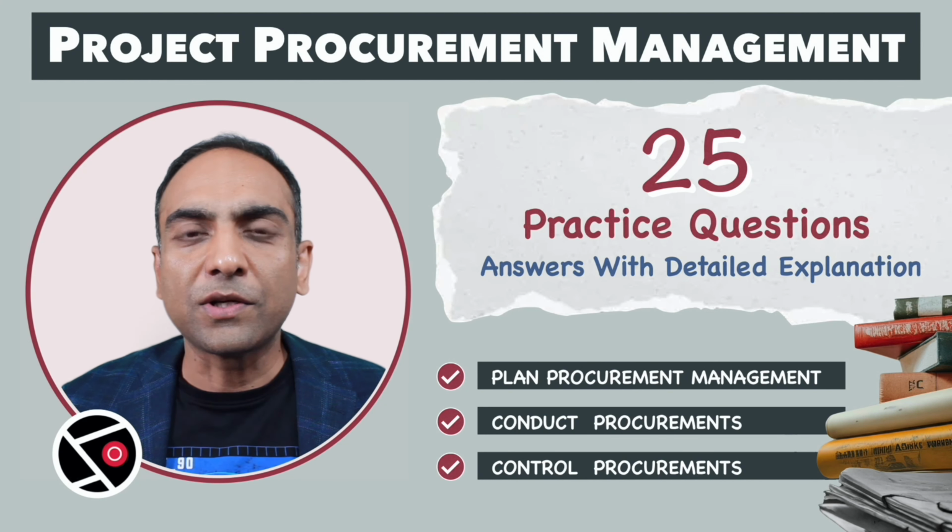D. No seller is capable of managing or owning all the risks associated with the project. The contract might allocate specific risks to the buyer. Correct again. All risks cannot be borne by the seller. Some are owned by the buyer. For example, limited liability clause is often used in the contracts to limit the liability of the seller.